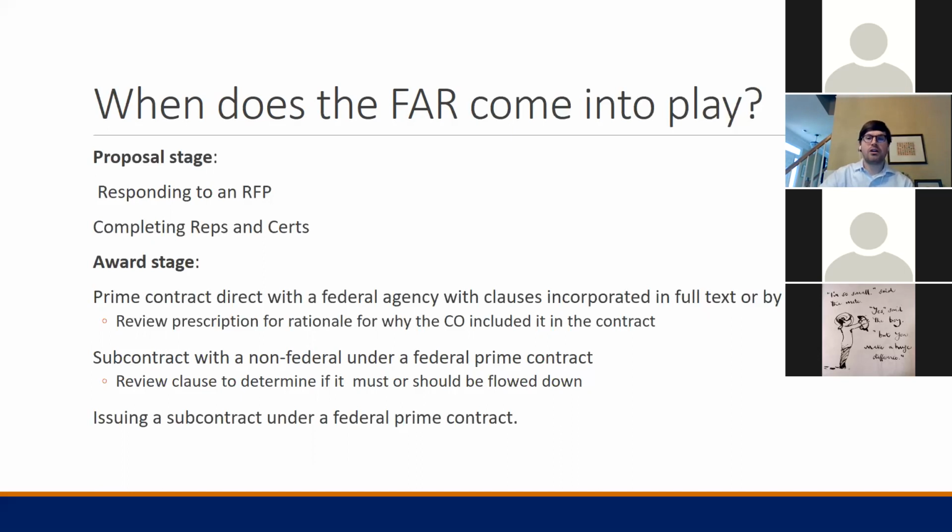obviously a prime contract that incorporates by either full text or reference, and that means either just the reference to the clause itself or the entire text copied in. There's no legal difference there; it's incorporated either way. So if you include it just by reference, all of the language underlying that clause is incorporated, just so that they don't have 1,000-page contracts. They do it by reference.